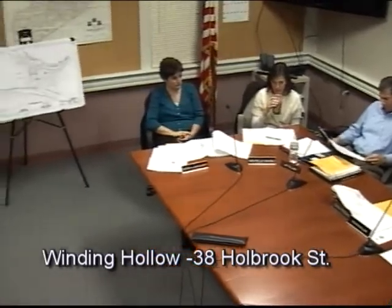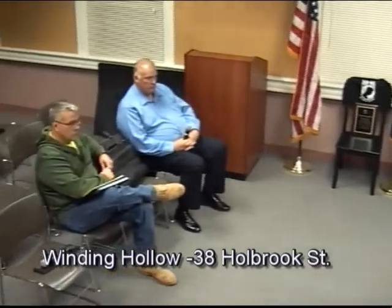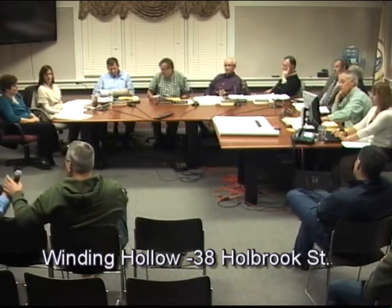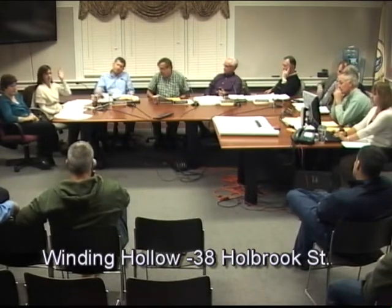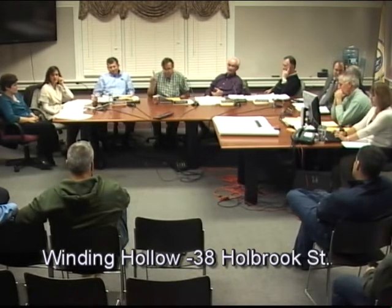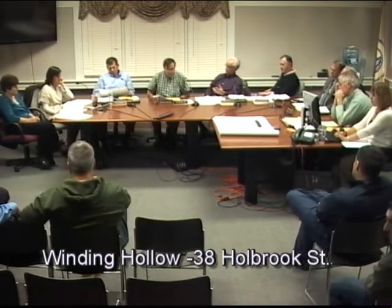Tommy, even if we didn't own the radius, we could still go in and do a short-term well test, right? Just to check the production. You got it. And that would give us a good idea whether their data really is on the right track to being valid, and then go from that step. Yeah, that's right. Now it's just all conjecture. The first test is about 35,000, and it's a short-term test with a smaller pipe, but it does give them an idea of whether the longer-term test has a chance to succeed, and maybe we should get that test done before we decide to adjust the subdivision.